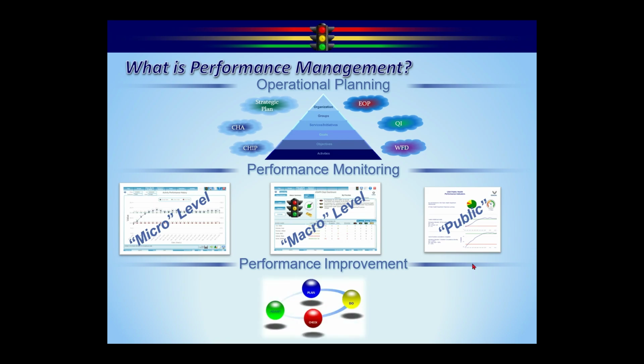And then the last step here: the reason we do the performance monitoring is so we can utilize the PDCA cycle. During the do phase, where we're executing, we're collecting all the information in the background. All that information we're collecting is what feeds the performance monitoring tools. Then we're going to use the check phase, which is comparing the plan to the actual. You may remember our objective to reduce smoking at Wayne High School by 25% by the end of the school year. So that's the plan. The actual is how far along we have come? And that's what's being fed back in here.